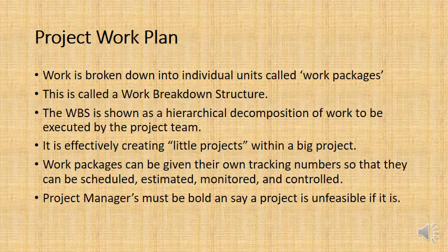Now, this is called a work breakdown structure, or a WBS. It's basically a hierarchical decomposition of the work that needs to be executed by the project team. Now, with each work package, you will normally be able to assign a certain amount of money to it, a certain amount of time, and also you can list any key resources that need to be given to that work package. And normally, to track these things, we give the work package its own tracking number.